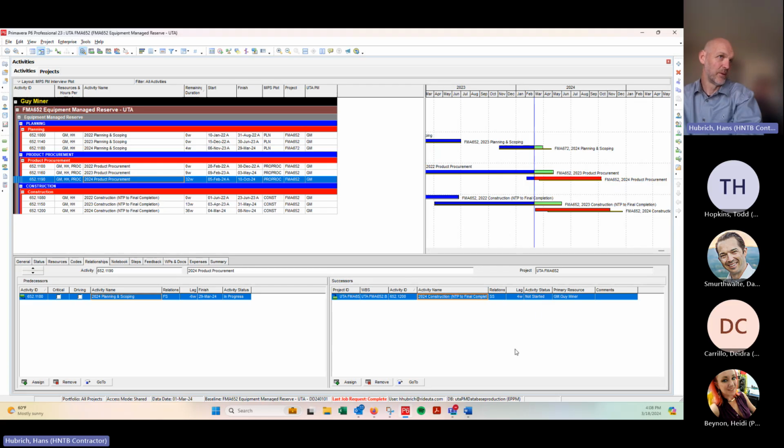Does that work? I think I know the answer to this, but it works push and pull, meaning that if you adjust the latter date, then it calculates backwards 4 weeks. If I said this was starting at a different date, would it change this one up here? Yeah. It won't. It only follows downstream. If I change something downstream, it doesn't automatically change something prior to that. Okay. Good.